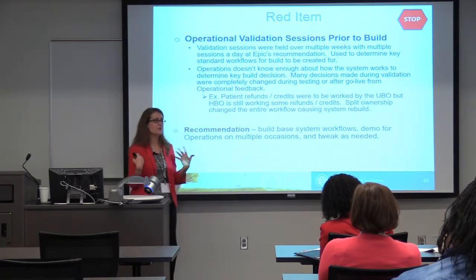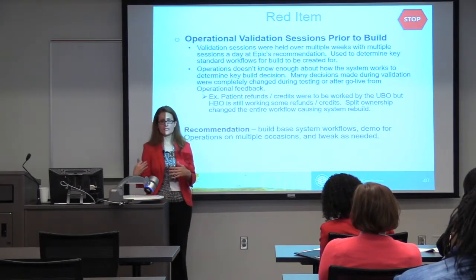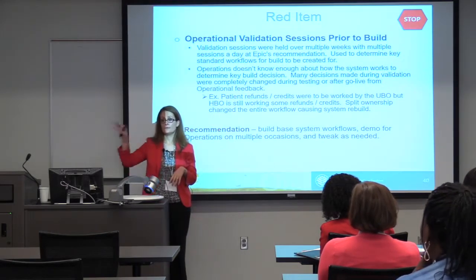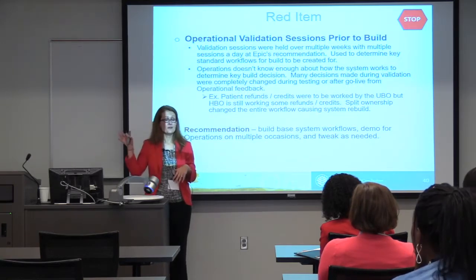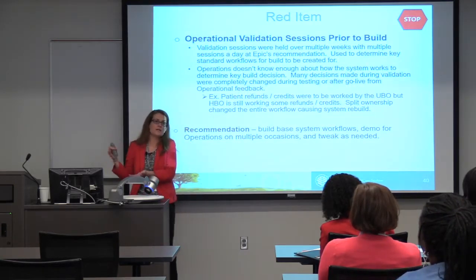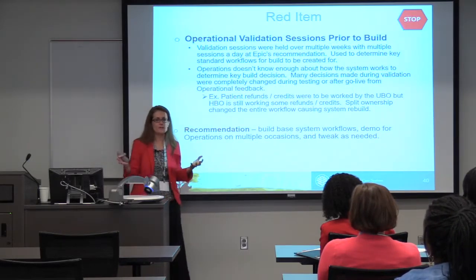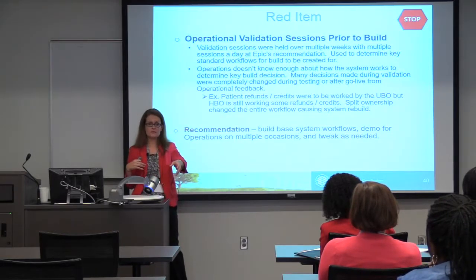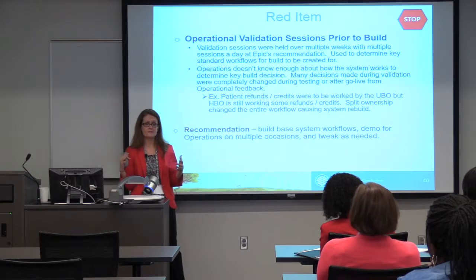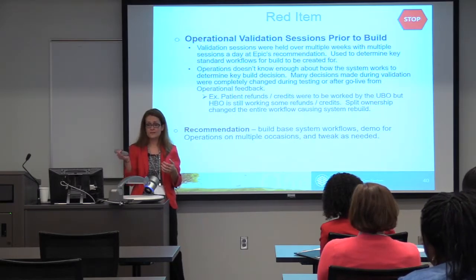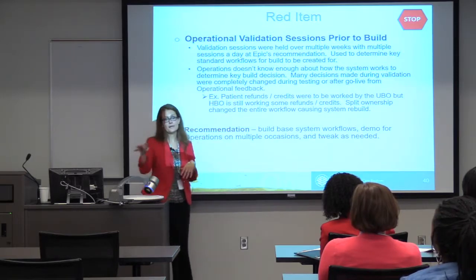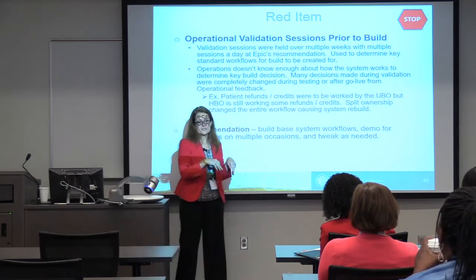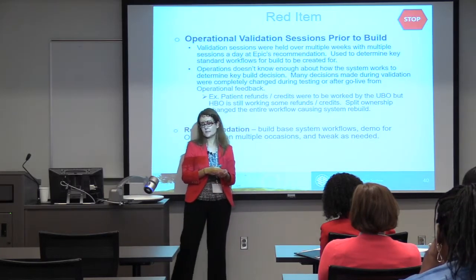Build the system workflows as you think you know. Our project team was staffed half and half. Half were existing IT members and half were pulled from operations. So, quite frankly, they may not know everything about what the workflow should be, but I think we can build it and then demo it for operations, let them get into the test environments, let them play around and see if this works. If you find out, oh, that doesn't work, okay, we'll tweak it and bring it back to you. My personal recommendation is you build, you demo, you tweak. You build, you demo, you tweak until you get it right where you want it.